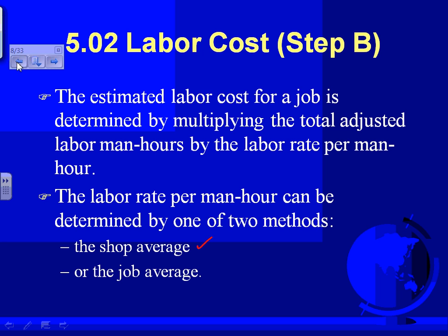Or Florida is probably. Okay, so this is the shop average. Because I don't have my shop average, I can't find it. Let me tell you, for any question about shop average, keep track over six months of your labor hours and the labor dollars you paid, and divide the labor dollars by labor hours. But remember, apprentices and journeymen have different rates, and you come up with a shop average rate.